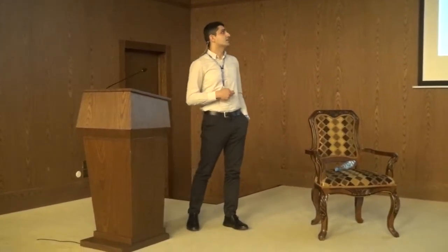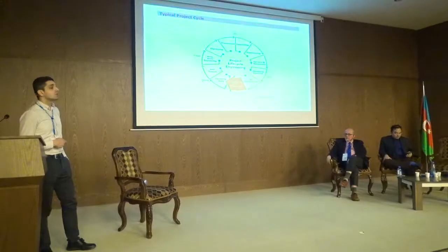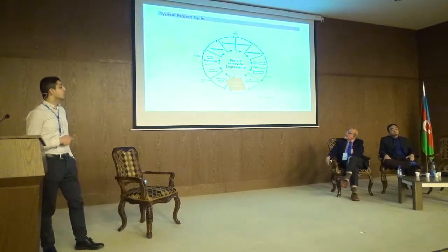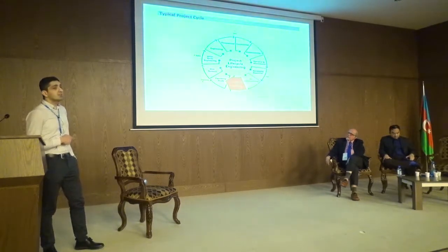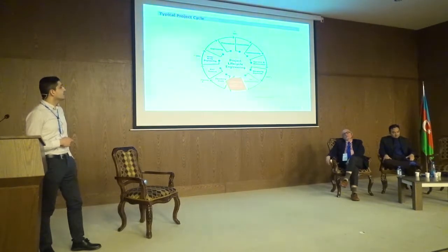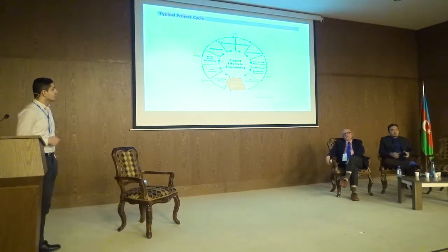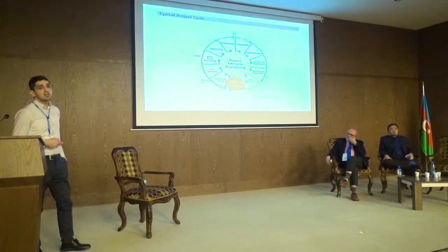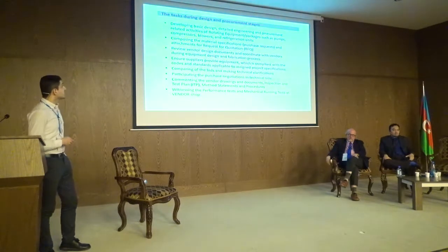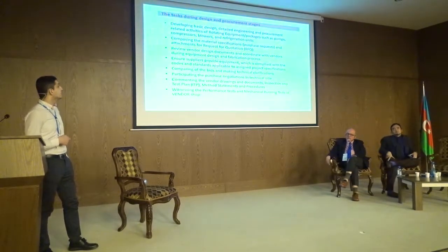And then it goes ahead with front-end engineering design, and then we start the execution phase. We do the detailed engineering, we do the procurement, construction, commissioning, like pre-commissioning, commissioning, and then the plant is ready for operation. We do the performance test, production test, and then the operation and maintenance phase starts. And during the whole project, and during the operation and maintenance phase, the rotating equipment engineer is very closely involved. And how is he involved? So these are the tasks of the rotating equipment engineer during the project phase, which I have listed here.